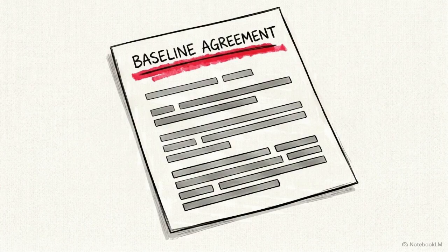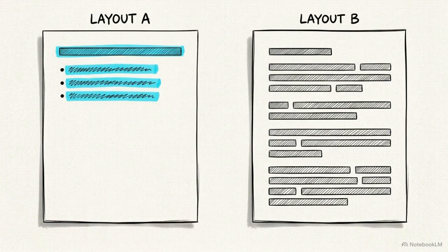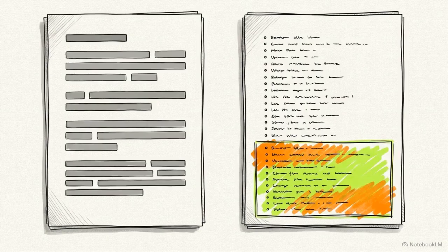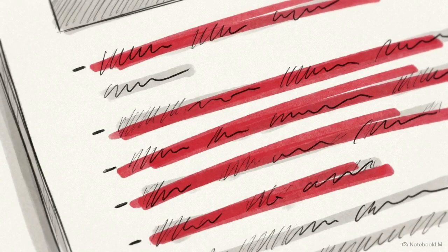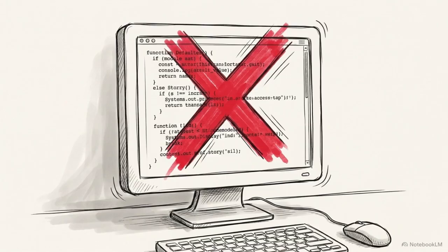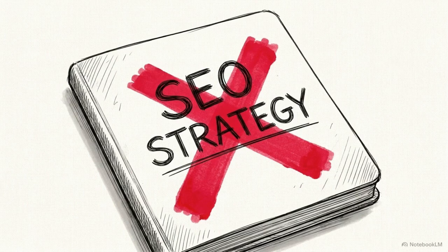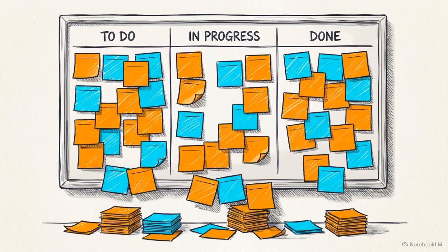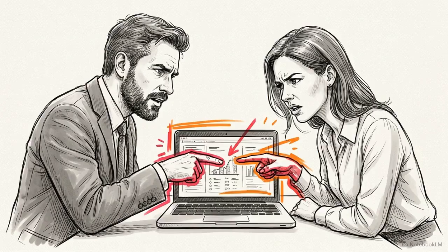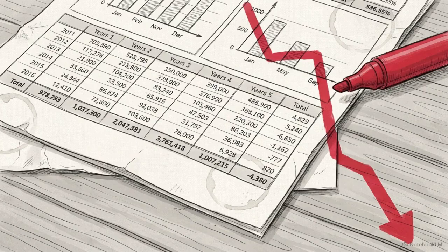The defense of any project begins before a single line of code or copy is written. You must establish a firm baseline by reviewing your statement of work. Look at the comparison. On the left is a standard statement of work that only lists project inclusions. On the right, we have a robust document that clearly highlights an explicit exclusions section. This exclusions list specifies exactly what you will not do. For example, third-party API integrations, custom project photography, or ongoing SEO writing. When you omit these boundaries, client expectations drift. Identifying out-of-bounds requests becomes a matter of opinion rather than fact, leaving your project financially defenseless.